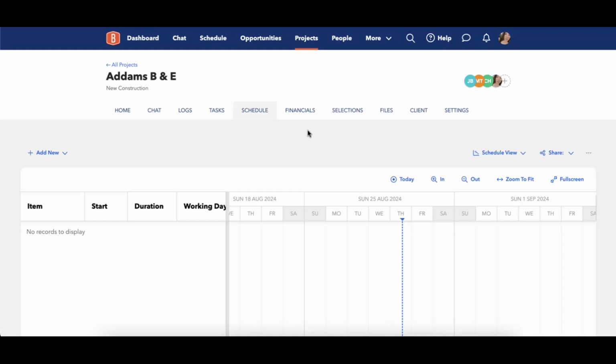Tasks, on the other hand, are a little bit more granular. These are the tasks for those specific phases in order for them to complete. An example might be a framing phase, and the tasks inside of that phase might be that you need to rough-in for your HVAC, rough-in for electrical and plumbing, and you have a framing inspection that you have to complete and finish in order to move on to the next set of things. Those are the granular to-dos that tasks are designed to track.